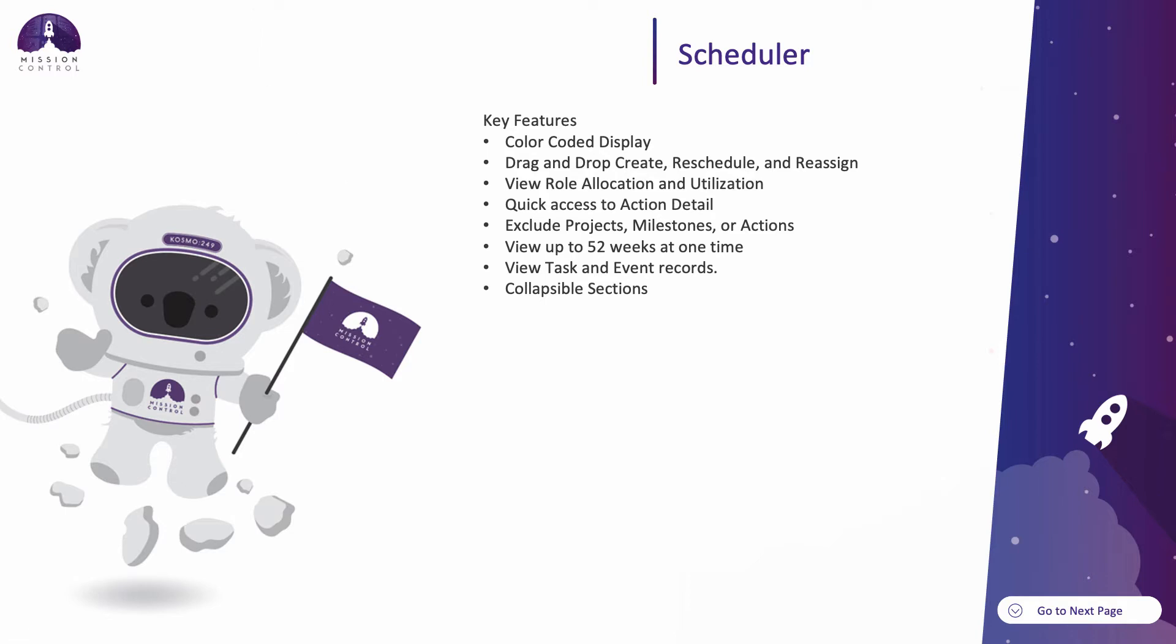You also have the ability to view each role's hours allocation, which shows the hours scheduled versus the hours available per week. While also taking into consideration holidays, you can view the utilization percentage for a role. Where the hours allocated are more than the hours per week, then this will be highlighted red.